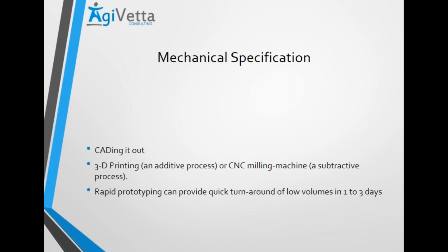So this could become more like your prototyping process, which again you can iterate through if you have rapid prototyping tools or manufacturers or vendors available. And typically when we involve hardware design, there are manufacturers who specialize in rapid prototyping, who may give you a low volume, 1 to 3 day turnaround for any of the devices you are talking about.